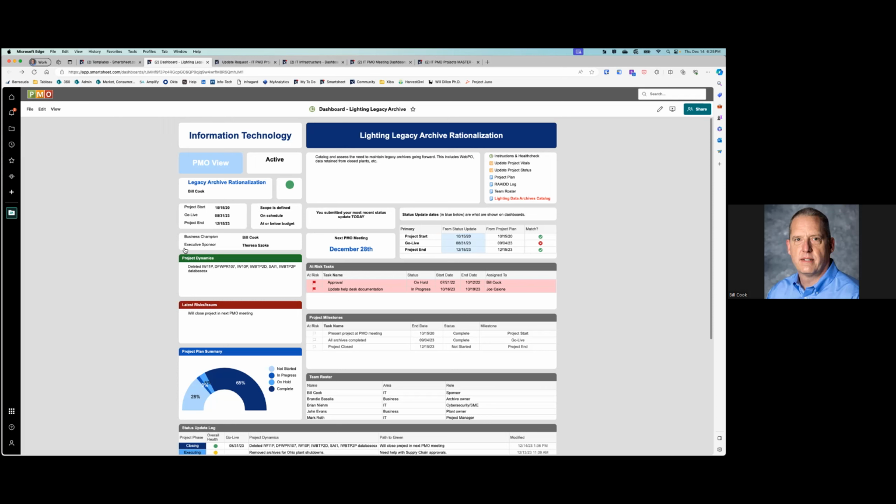So these dates, all this section over here, is what's going to filter up through the organization, and they don't match the plan. So this little table says, hey, you have a project start date, and your status update and your plan have the same date. Green check mark. That's great. Go live, you're not showing the same dates. Red X. You should probably go investigate that.